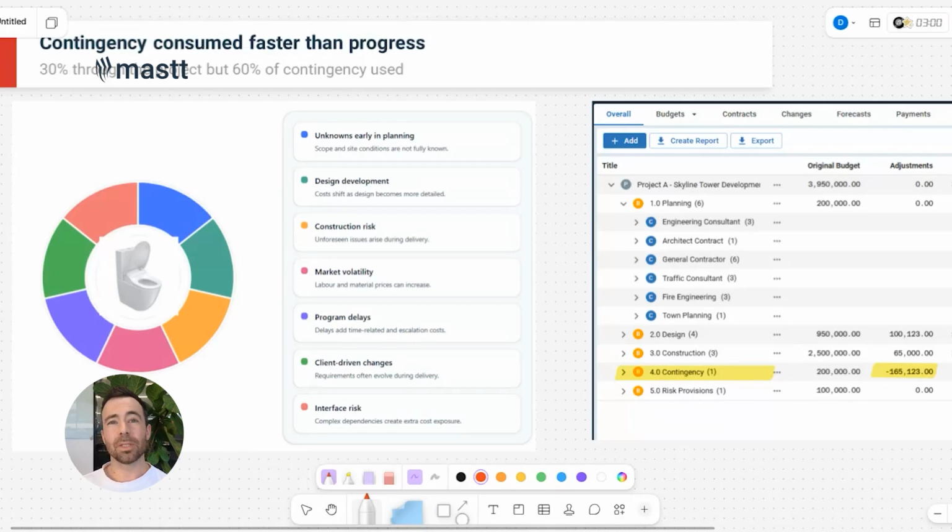You want to hold on to the contingency and release it slowly through the life of the project so that you can help mitigate those cost overruns when you need it. It's not really a bucket of money that people can just spend on whatever they want. That's not what it is. So you want to be keeping track of those adjustments that are being made, how much contingency is being transferred out, keep a list of it, track what it's for, and then you'll have much greater visibility over your budget and being over budget. That's why I'd say behind all of this, behind the cost report, you want to have more registers for these things so that you can drill down if you need to.